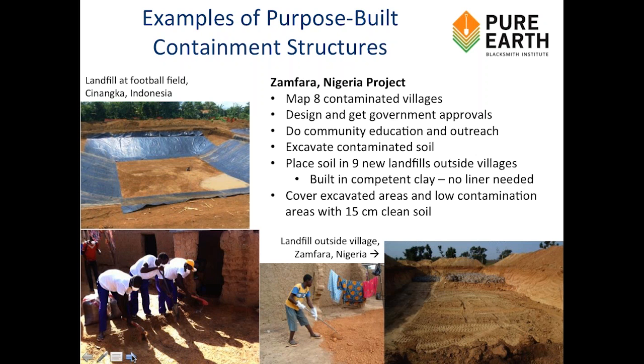You can see that it looks like a regular landfill cell in construction with a liner, and then the drainage and that sort of thing was put in afterwards. The bottom three slides show the work that was done in Zamfara, Nigeria. It was 8 different villages. We built 9 landfills just outside those villages, typically about half a kilometer away.